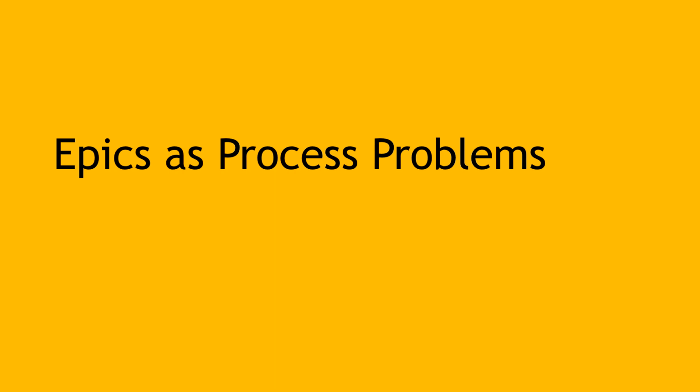If you find that you can't decompose an epic into stories worth less than 13 points each, there is probably too much uncertainty around the features or too much complication within your feature. This should immediately trigger a conversation with the product owner and possibly with the end users in order to gain clarity and identify the minimum viable increment of functionality for the story. There are certainly edge cases where a single large story may be justified as long as it can fit within a single iteration. However, claiming that the story can't be decomposed generally indicates an underlying process problem.